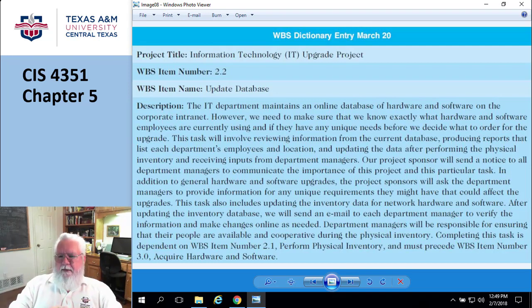Okay, it's simple. I'm building a portable computer and I say it has to be under 6 pounds. Oh, okay, fine. Put it on the damn scale and tell me how much it weighs. Those kind of tests are kind of simple, right? But I have to have something that tells me that you've done what you're supposed to do. Okay. So validation requires some sort of acceptance testing. And quite frankly, it could be important if your contract was designed with partial payments involved.